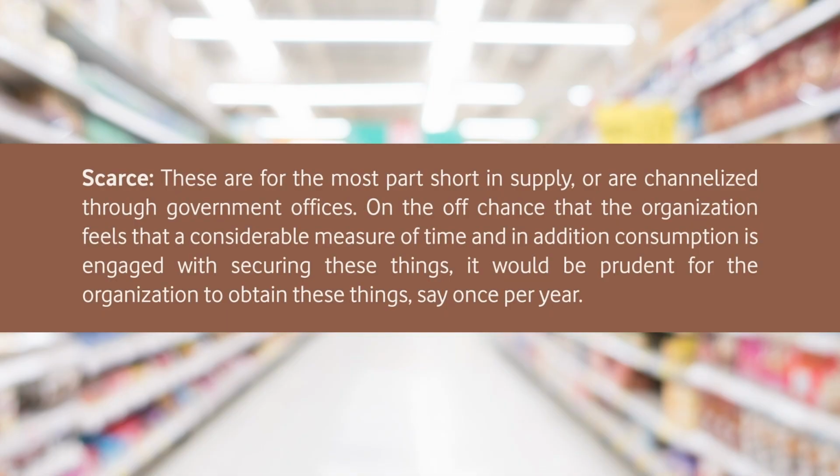For scarce items, most of the supply is channelized through government offices. If the organization feels that a considerable amount of time and expenditure is involved in securing the items, it would be prudent to obtain these items, say, once in a year, because their procurement takes very high lead times.